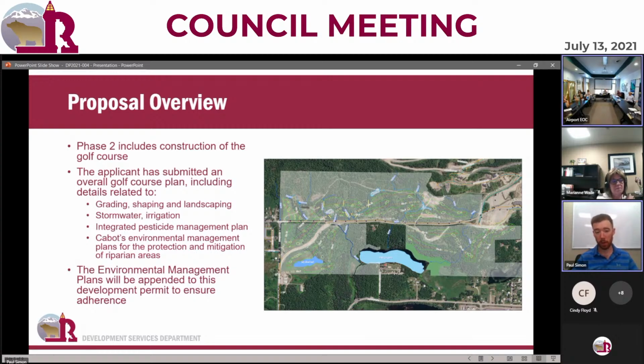Very, very critical here, and we'll go into a little bit more detail later on, but this environmental management plan does outline obligations for overall monitoring. So for instance, water quality monitoring, which is a major concern of both staff and the community for Williamson Lake. There's going to be 10 separate areas for surface water collection monitoring. Reports will be completed all the way from pre-harvesting stage to post-construction stage that staff will be involved with, and we can get into some more details on those later.